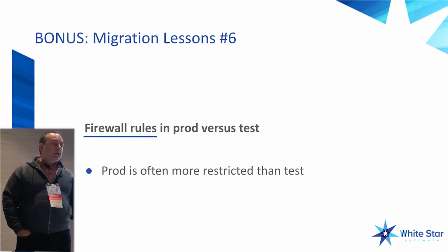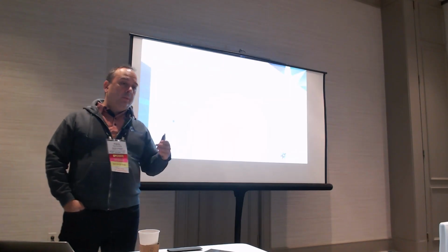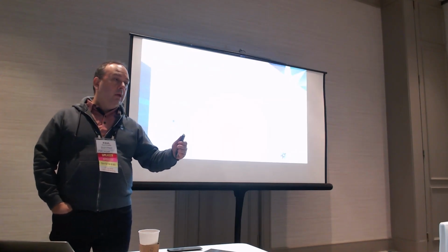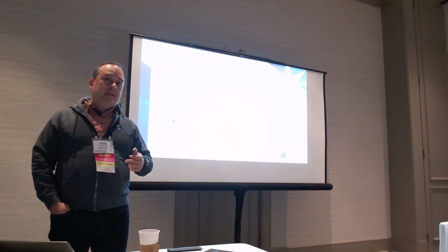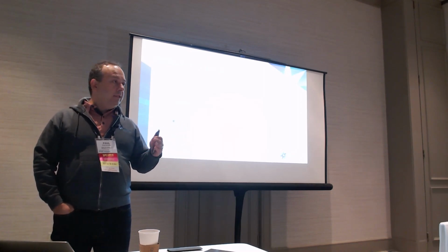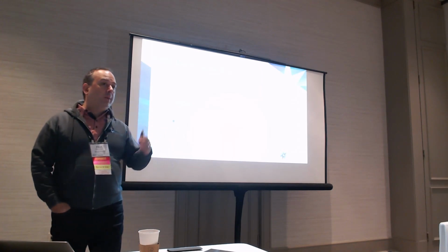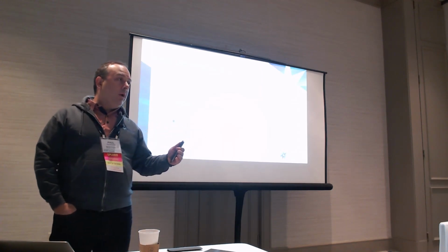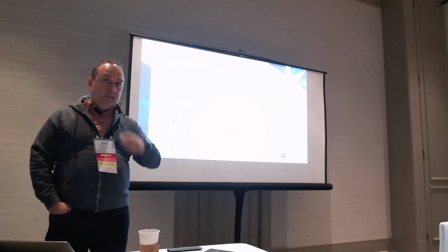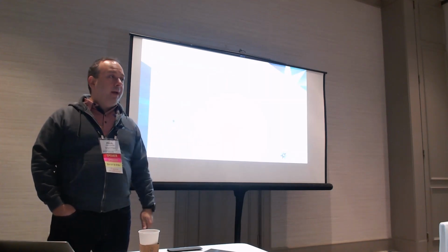So we recommend going PAS on 11 first. The reason is that if you go from classic to PAS on 11 and there's a problem, you just go right back to classic, right? You put your tail between your legs, run back into the lab, and say, okay, let's try this again. If you jump to 12 and there's a problem, we dealt with this recently: a customer jumped to 12 into PAS, and there was no going back to classic.